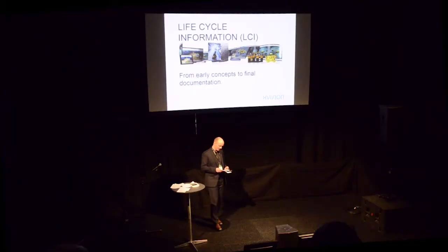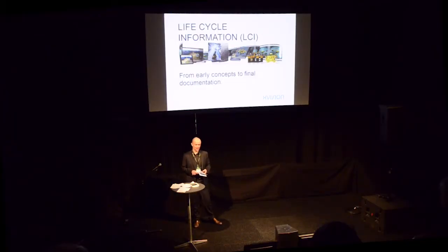During this project, we discovered errors that were corrected in the very early stages of the project and saved potentially a huge extra cost for Aker. Like ROV access to the equipment, to the Christmas tree, collision detection, equipment interfaces, and so on and so forth. So, it is cheaper to uncover errors with visualization than during fabrication or when offshore trying to install it.